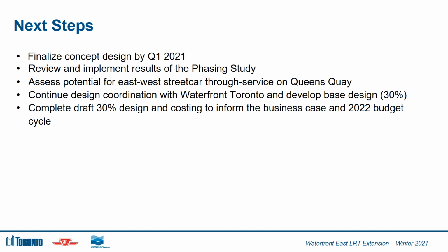This includes consideration for the need for the protection of a future Brandon Line connection at Union Station and looking at potential of east-west streetcar through service on Queens Quay prior to completion of the station works. We will also continue the design coordination with Waterfront Toronto on Area 2 works, continue engagement with stakeholders, and coordinate interface and integration requirements. And finally, we will be completing draft 30% design and costing to inform the business case and 2022 budget cycle.